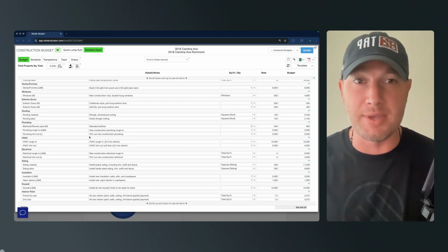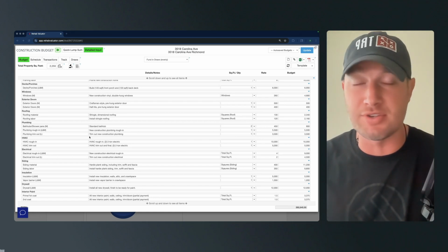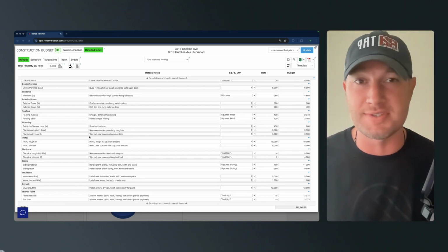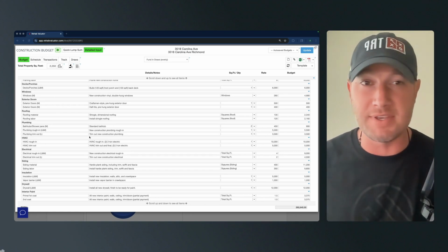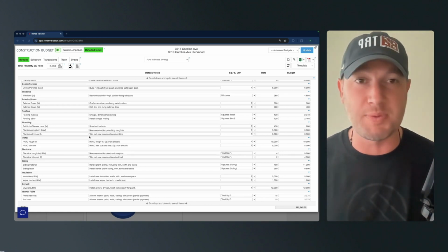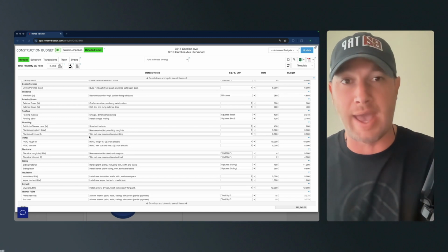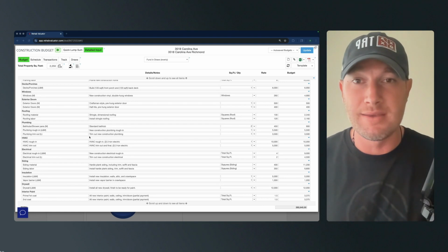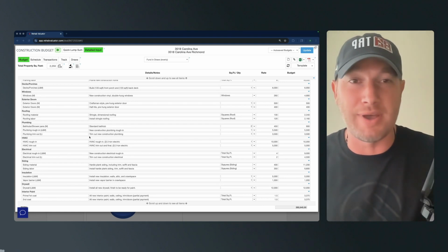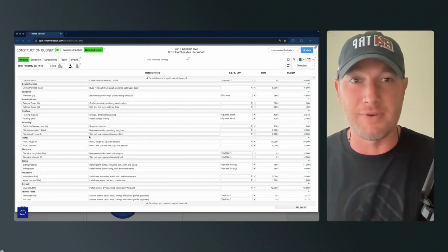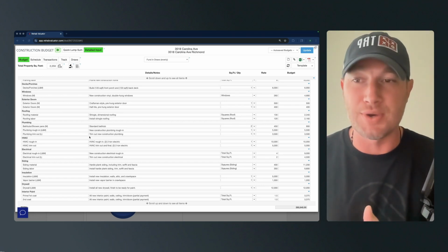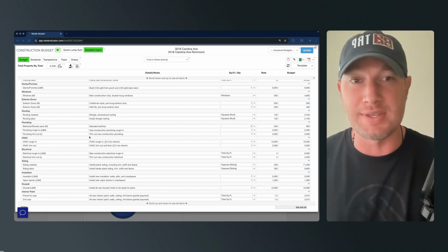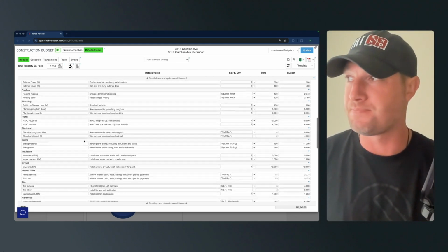You go to a big plumbing company, it could be like $1,000, $1,200 per point. You go to other guys, it could be like $600, $700 per point. You have to have these conversations with them and just be honest. Like, look, I want to estimate more accurately so that by the time you give me a bid, I know exactly we're in the right range. So I don't have to turn you around and start looking for other people. I want to know this early. So ask your plumbers how they estimate or how they give prices so you can estimate costs better as well.